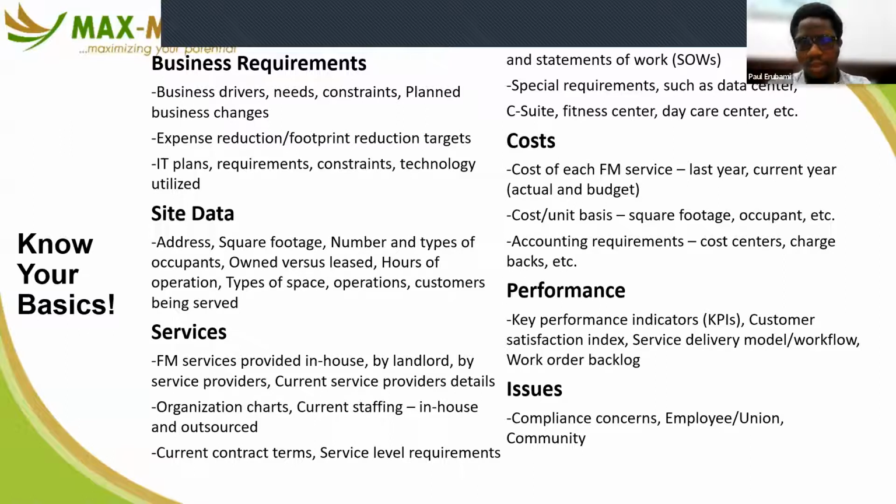If there are contracts in place, you must understand the terms of the contract. Many of us learn about the terms of contracts from our contractors. I have seen a facility management organization that had some contracts in place for more than 10 years, and nobody in the organization could find a copy of the contract that was signed with the contractor. We had to go to the contractor to give us a copy of their contract. And boy, how different it was from what we were doing at this time. We had verbally changed and changed and changed, and nobody had documented anything.